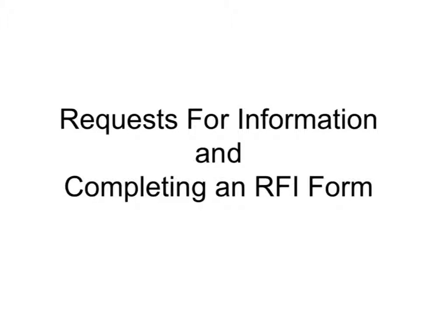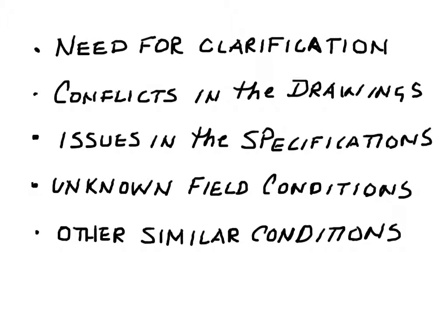Requests for information and completing an RFI form are important tools in the construction industry. Many times in construction, there are conflicts in the contract documents, drawings, or specifications that may require clarification in order for the contractor to fully understand exactly how to proceed with the work. In many cases, the contractor or subcontractor does not become aware of the need for more information or clarification until the work is about to take place.